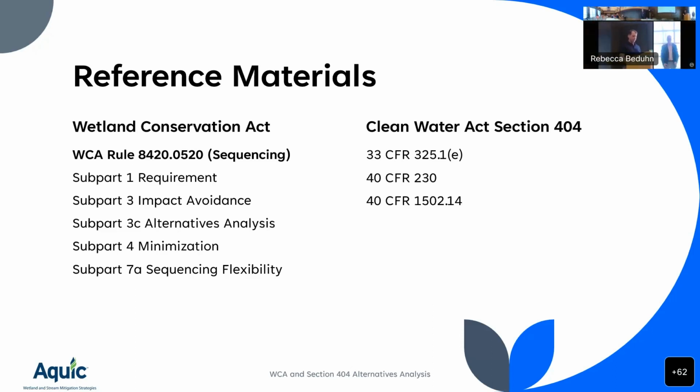That brings up a really good point that may be helpful to understand, especially if you're getting information requests or talking to a Corps project manager. There's way more going on than the Clean Water Act 404(b)(1) guidelines when it comes to our permit decision. We have what we call a combined decision document at the end, because a whole bunch of things are rolled into one, and some of them overlap. NEPA's the obvious one. There's the Clean Water Act and the 404(b)(1) guidelines, pass/fail. Like I said, it's a yes or no, a deny or not at the end. NEPA is procedural, whether it's an environmental assessment or an EIS. It never results in a yes, you can do a project, or no, you can't. It's an environmental analysis and public involvement.